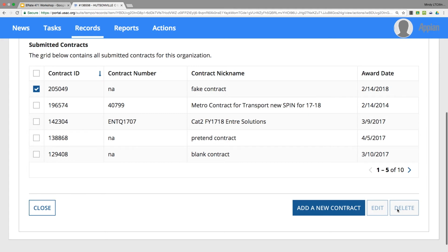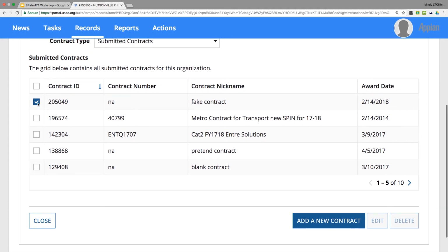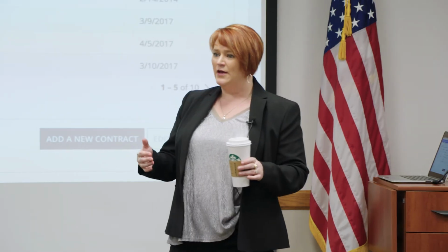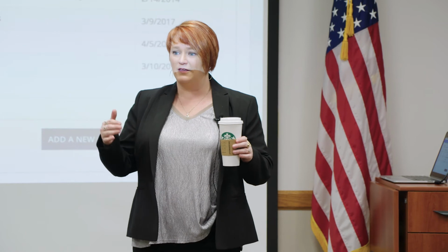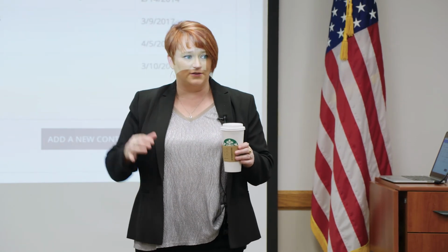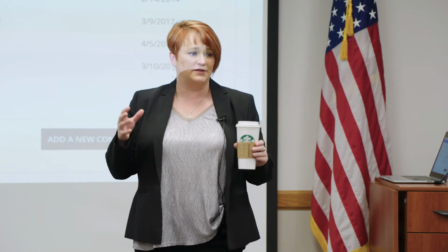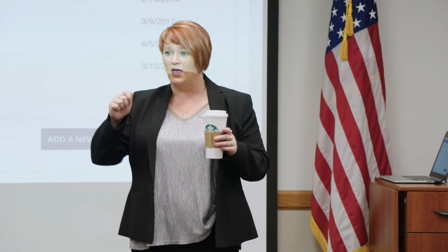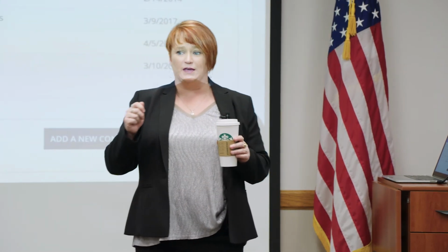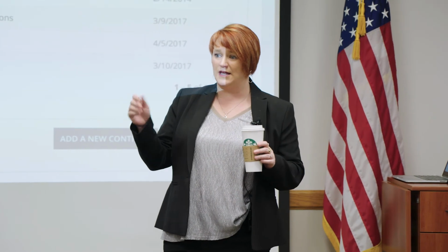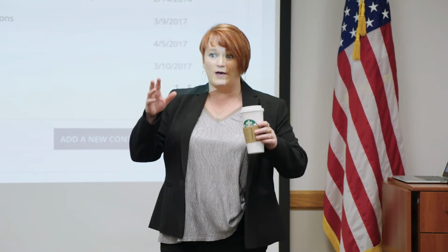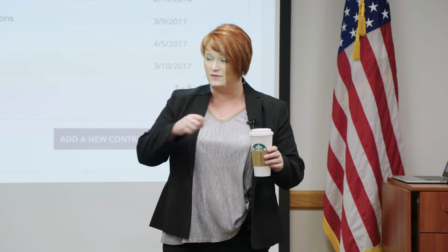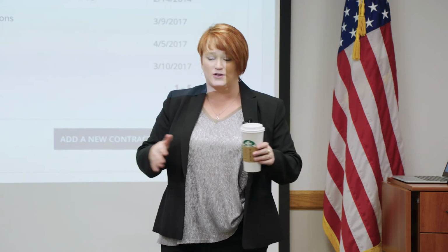So for example, if you put in a new contract today and you have a bid for category 2. A contract is anything that shows that you and the service provider are going into a deal together. So if you have a bid for category 2 and that is the one you've chosen with your matrix this morning, and you want to get it to be a contract, you should do one of a couple of things. Sign and date it, initial and date it today, and then show that you have sent a copy of it to your provider so that they can initial and date it. That is a contract per your USAC.